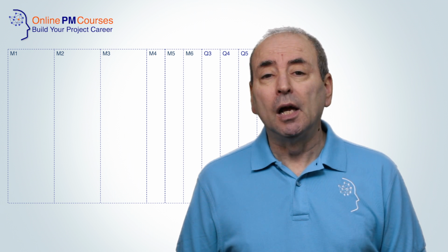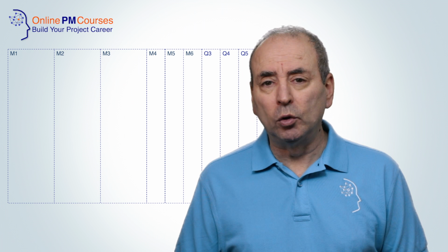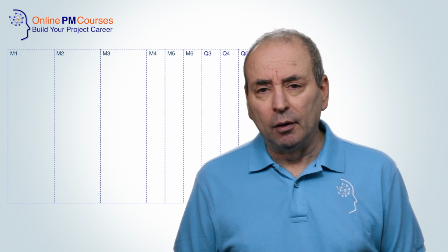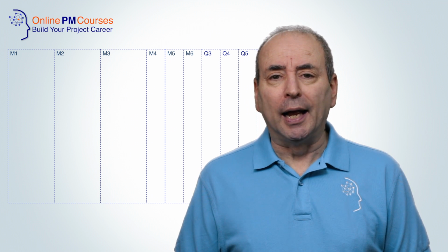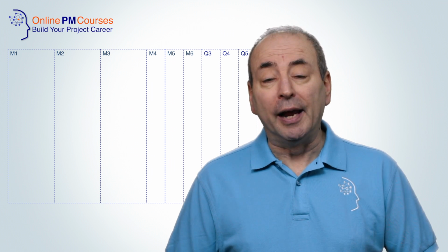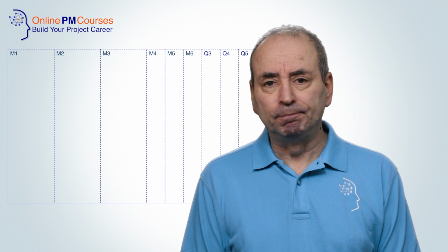In my experience, we might plan the first 3 months in detail. And then the next quarter, maybe the next 2 quarters might be in less detail. And then subsequent quarters will just be shown as priorities for each quarter, rather as we would do for a far-out roadmap or a project or program strategy.